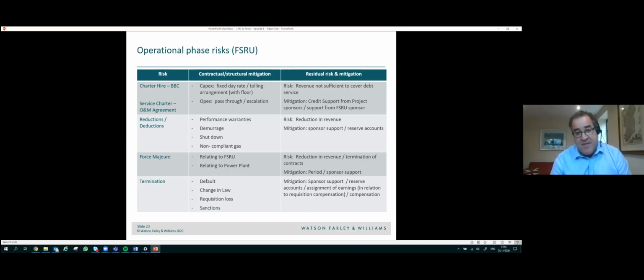Now, during the period of force majeure, the FSRU will generally either remain on hire at an agreed rate that will allow the FSRU sponsor to cover debt service, or it will be at a reduced rate commensurate with any reduction in performance that results from the force majeure. Needless to say, neither the FSRU sponsor nor its lenders will want the project to be entitled to maintain the FSRU under the charter for an extended period at a reduced day rate. And in such circumstances, the FSRU sponsor will usually require the right to terminate after an agreed period where the FSRU is subject to a reduced rate.